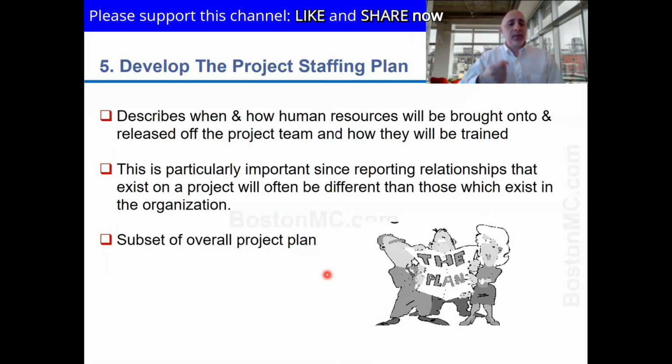Maybe someone is keeping track of the expenses on the project. Maybe someone is handling the communication on the project. Maybe someone is handling vendor-related documentation, signed paperwork and so on. So these don't really have places on our schedule where we put them, but they are necessary activities. So two types here. One that is going to do activities on the project, and there's another type that does administrative project management, follow-up monitoring on the project.